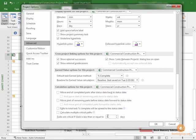But when tasks reach slack of zero, they become critical. That means that any further delay, the task will become late. So you can affect this number, in which case, when tasks have one day or less of potential delay, they become critical.